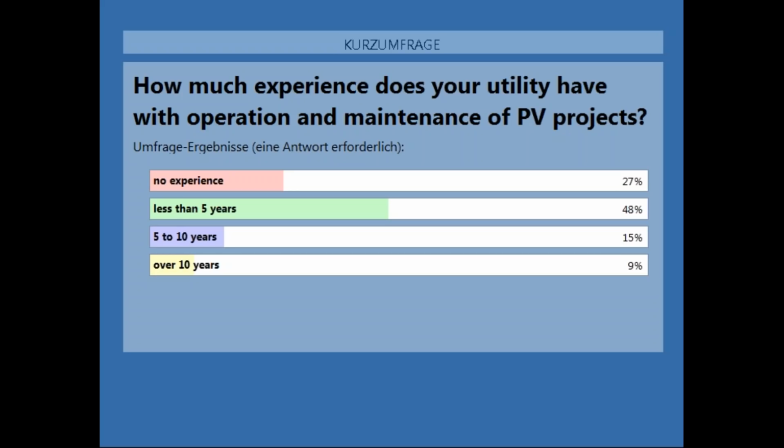So what we did was, with the lead contractor, we signed a 5-year maintenance agreement. Within that 5 years, the contractor is responsible for maintenance at the PV park and battery systems to a certain degree of expertise. And in that 5 years, we will go along with them. And after 5 years, Stucco will assume that responsibility directly.